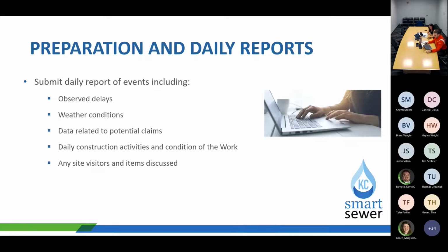Crew number 1 laid sewer line at, again, station 0+00 to station 2+00, and they didn't hoe ram any rock. Or if they had 3 different crews, note exactly what location and what sheet they're on and what the crew was doing.